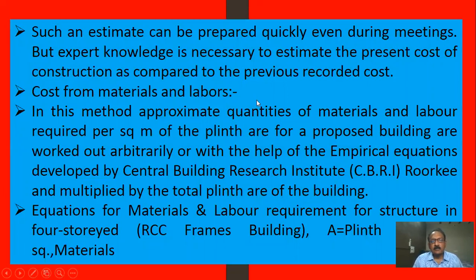If you look at this method, approximated quantities of material and labor required per square meter of the plinth area for the proposed building are worked out. For example, for kitchen, bedroom, hall and veranda, you will have separate rates for separate rooms, and different empirical equations developed by the Central Building Research Institute, CBRI, Roorkee.